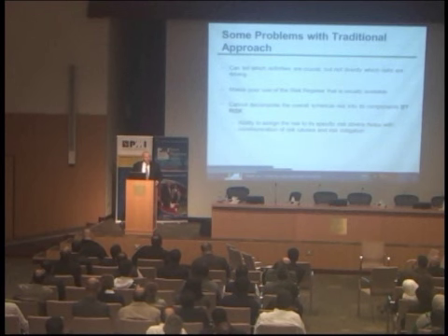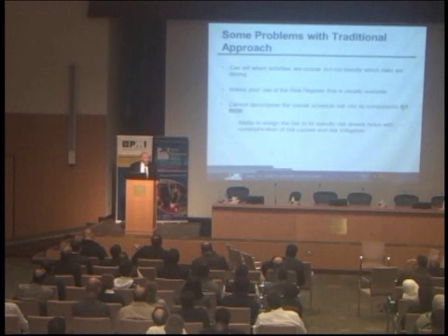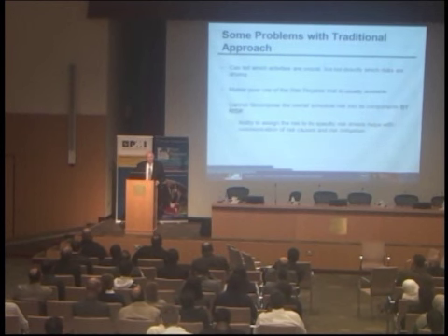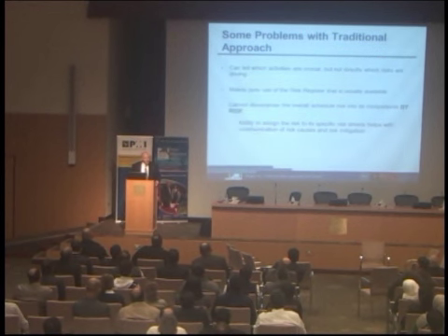And I find this out how? In doing my quantitative risk analysis, I interview people one-on-one, and I promise them confidentiality. I promise them that their boss will not know what they said. These 30 people I interviewed for the quantitative parameters, I won't tell you that this person said that. So all of a sudden people can speak freely. Their boss is not in the room, and we won't tell the boss what they personally said. All of a sudden they start talking about risks that, believe it or not, are not in the risk register.